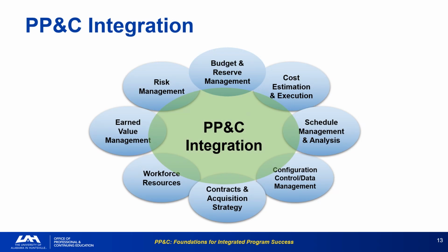This chart illustrates the interconnectedness of all PP&C functions. Integration is at the center because none of these disciplines can operate effectively in isolation. You must understand the inputs and outputs between functions, such as how schedule management feeds into cost execution. A strong EVM program is useless if it is built on a non-integrated schedule or an incomplete risk posture.